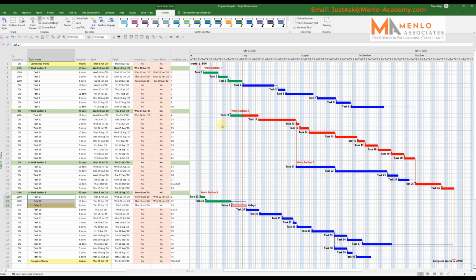At the end of the first month, you show the changes, you track all of the changes and the events that have happened. You save a new baseline and you save the program at that point as revision B. So at that point, when you print the program out, you can show the changes against the original program. So you're reporting on the last month, and that becomes your as-built program for the last month, and it's the proposed program for the remainder of the job.